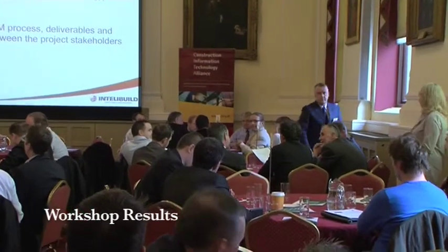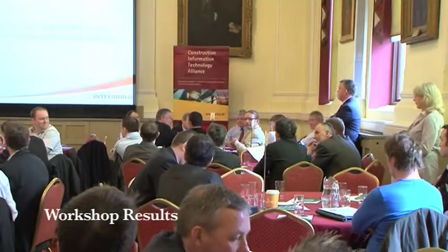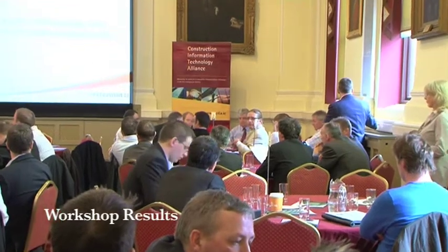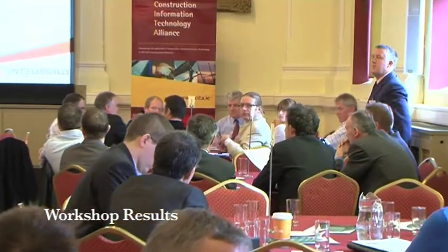Okay. Provided protocols are agreed prior to the start. During the construction stage, I think it does come back to the contractor, and during the project handover, again, it's the contractor. But say the likes of the M&E contractors, specialists would have to be responsible for updating models, but that would have to be specified by the contractor to the M&E consultant, or to the M&E contractor during that tender stage.